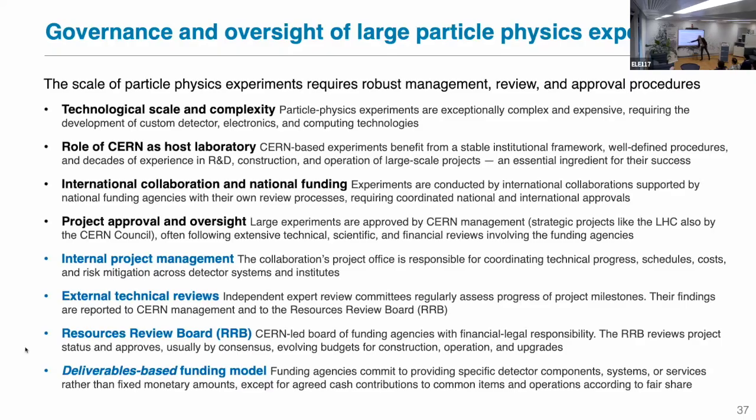So then there's this resources review board, which is a CERN-led board of the funding agencies. So it has representatives, 1 or 2 per funding agency, and they are mandated to approve budgets or not. With financial legal responsibility, the RRB reviews the project status and approves, usually by consensus, this is very important, evolving budgets for construction, operation, and for experiment upgrades.